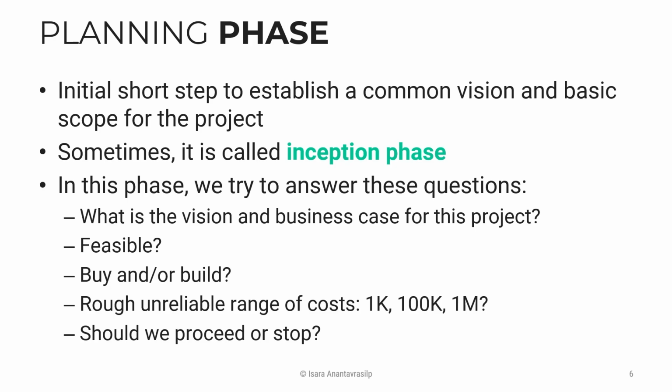If it is 100,000 baht, can we afford that? Can we pay for it? If it goes to around 1 million, can we pay for it? For example, if it costs like 1 million, we need to invest something, and maybe it takes roughly 6 to 8 months to develop. How can we make it work? Is it worth the investment? Is the project going to gain income or benefit down the road, and so on? Once you have this answer, you decide whether you should proceed further or stop right here.